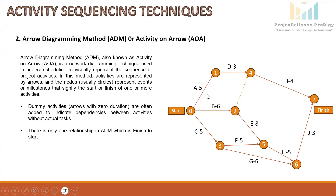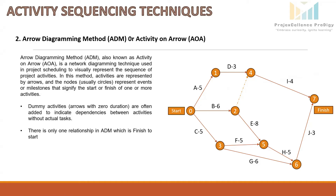In ADM, each arrow represents a specific task or activity that must be completed. The length of the arrow does not represent the duration — it is only a graphical representation. The node at the tail of the arrow represents the starting event and the node at the head represents the finishing event. ADM sometimes requires dummy activities, represented by a dashed arrow, which do not consume time or resources and are used to maintain clarity when there are multiple dependencies. The biggest limitation of ADM is that it allows only one type of logical relationship — Finish to Start — with no SS, FF, or SF.